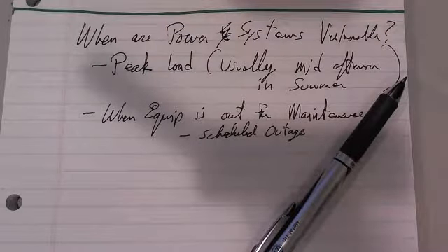But they say, okay, we're going to schedule it for Monday and Tuesday because those are the lowest level of load. The load tends to build towards Friday. Or maybe they do it on a weekend. Maybe they say, okay, you're going to have to pay your crew double time or triple time, meaning double or triple the hourly wage, and we'll take the transformer out on Saturday and Sunday. And that's done. Same thing for generators.